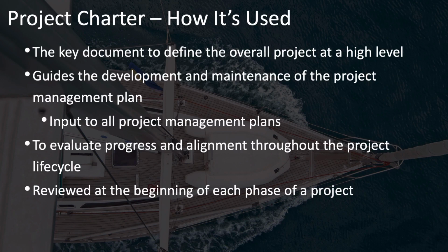As it is such an important document, it should be reviewed at the beginning of each phase of a project. Don't let this document become out of date. As things change during the project, keep your project charter up to date and review it periodically to make sure that it is kept up to date. The project charter is my favorite project management document.